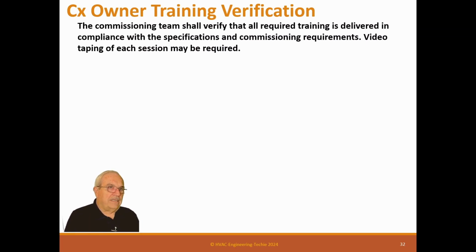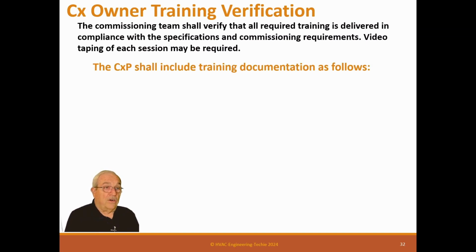So the commissioning team shall verify that all required training is delivered in compliance with the specification and commissioning requirements. Videotaping of each session may be required. Now, that's important for you to understand. You don't want to be that video person. It takes a lot of time, takes some equipment, takes some knowledge how to do that. And you should make sure that somebody else does that. And that's in your specification. When you created those specs at the first of the job, you should have made sure of where that's at. Videotaping is really important, but it's hard to do.